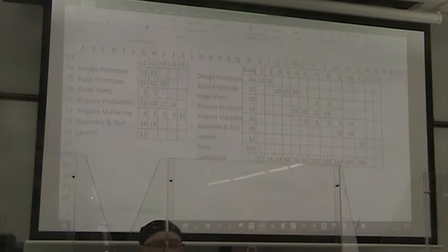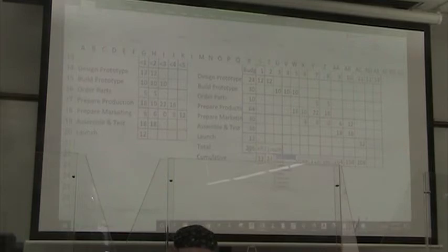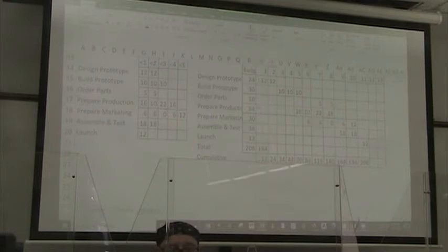Think of this as total remaining, and here I could go equals my total minus the sum of money spent on all of these. Of course, already I'm getting into a situation here, right? And then just pull that one over.